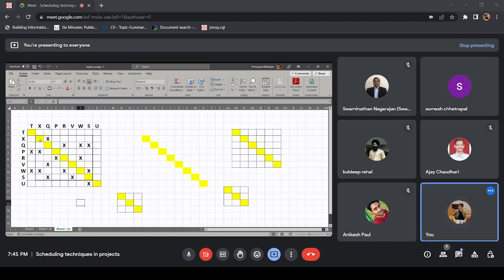Okay. So with this active block, now we don't know what loops are there. So we will start putting zeros and ones, converting it into a binary matrix. So this was your matrix. What you have to do is put 1 for every cross and 0 elsewhere.